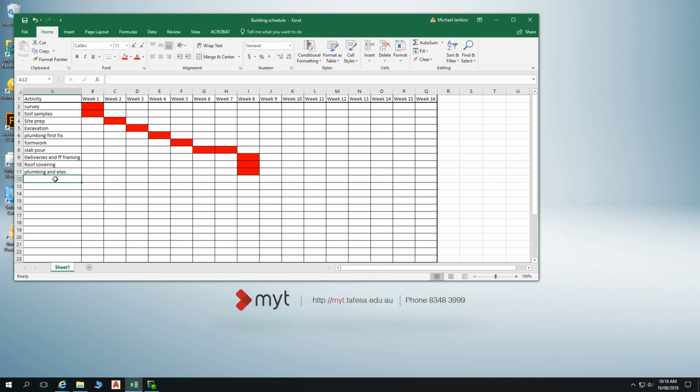Does it make a difference if it's tiles as opposed to sheet roof? Yes, because it's much more difficult to get under a tin roof than it is a tile roof. But also for anybody who's been on site while a roof is getting tiled, you probably wouldn't want to be doing anything else either. It can be pretty manic, cutting tiles, especially when you're doing the hips and trimming stuff, chucking tiles down. Sheet roof goes up quite a bit quicker, and can be more conducive to other trades working around as well, a little bit safer.